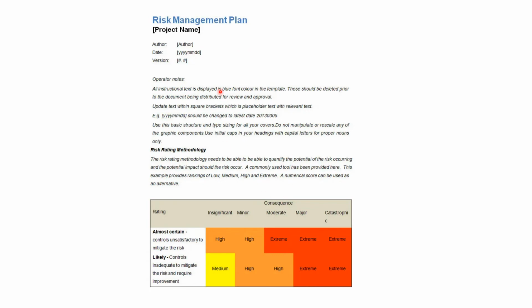This is an example of a risk management plan. One part of the risk management plan is a rating methodology. How do you rate your risks actually? How do you use PI? All those things you can define as part of your risk management. It might talk about how you source the risk, what the sources of risk are, and what the different categories of risk you can source are. It might talk about different levels of risk, enterprise risk as well as team level risk, project level risk, portfolio level risk. All those things you can discuss in a risk management plan.